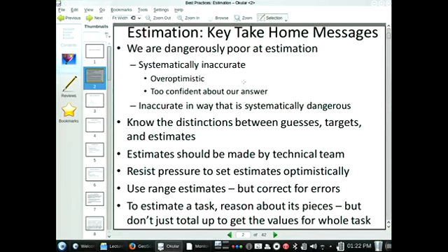So the point of advice here, and this is a point you'll see reflected in the practices of companies in the software industry, is to estimate a task, you break it down into its pieces. Don't estimate as a whole. Think in very concrete terms about what it takes to deliver on this task in a step-by-step fashion, and reason about estimating those things. And it turns out you can often do a much, much better job once you do that. Once you're reasoning about the detailed pieces compared to just estimating the whole thing.